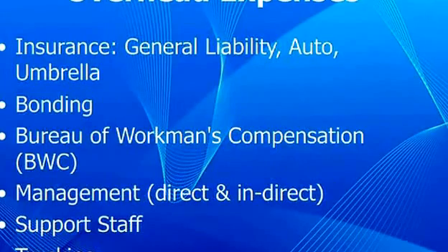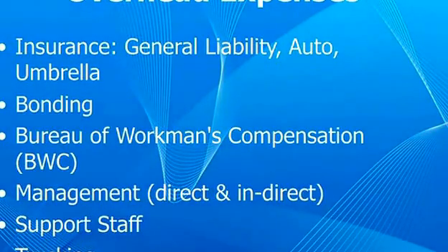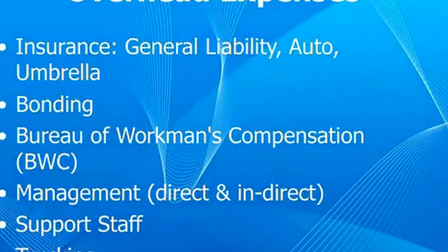BWC, this is something on the estimating side that can make or break you. And it's not so much on your estimate, but on the management of your jobs and running your companies. If you don't manage your BWC, your rate will make you uncompetitive. Every time you have an incident or an accident or a claim, it's going to affect that rate.